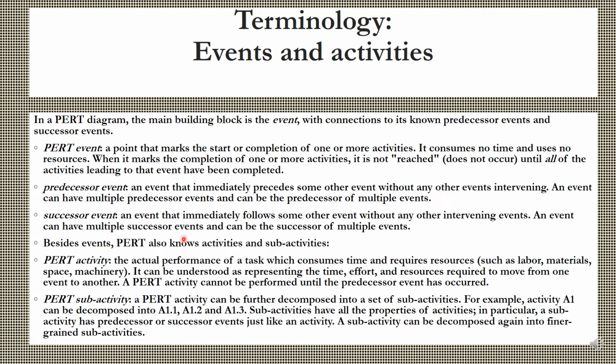Besides events, PERT also has activities and sub-activities. What are the activities? Like I've already discussed with you, the actual performance of a task which consumes time and requires resources such as labor, material, space, machinery. It can be understood as representing the time, effort and resources required to move from one event to another. A PERT activity cannot be performed until the predecessor event has already occurred.